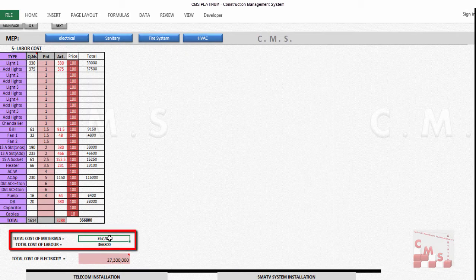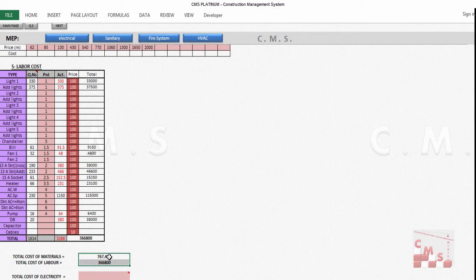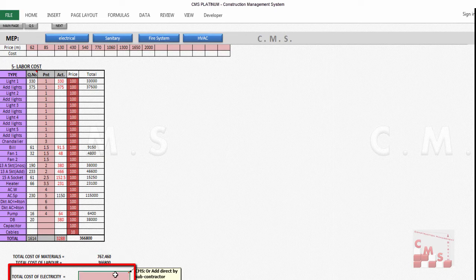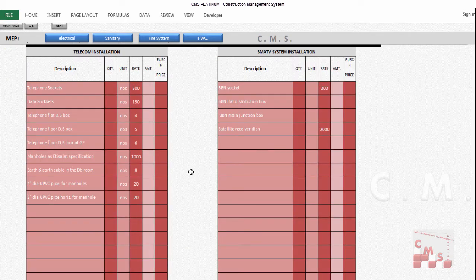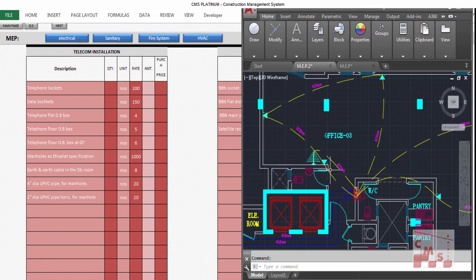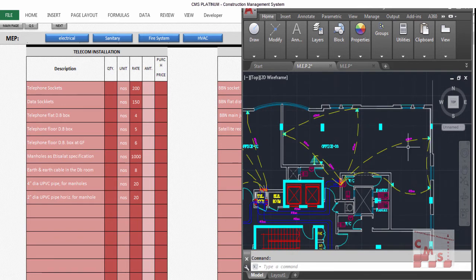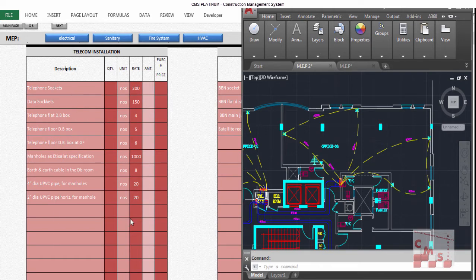CMS gives you both material and labor costs — that's the full cost of the electrical work calculated by CMS. Alternatively, you can insert the cost directly from a subcontractor quotation: CMS allows adding direct prices from the subcontractor. For telephone, TV, satellite, and data sockets, check the drawing for quantities and insert the number of each socket type for the full building. Insert the description, quantities, and rates, or add the subcontractor price directly.